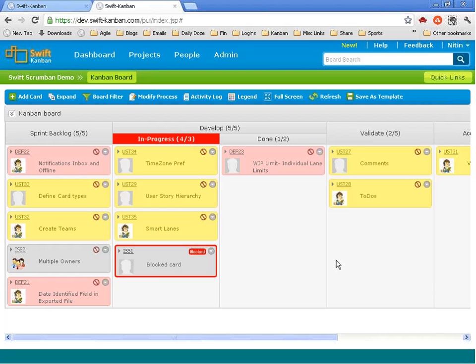So one is, a team can raise a bottleneck in case he does not have sufficient input. Bottleneck in general is something that you can always raise. For example, if you have 2 testers and you have 10 developers, and suddenly there is a queue of 10 cards that need to be tested, it immediately tells you that you have some uneven capacity in different teams. The more something is waiting in the dev queue, and QA is not able to pick it up, that means you're increasing your cycle time, right?